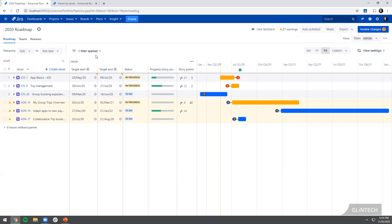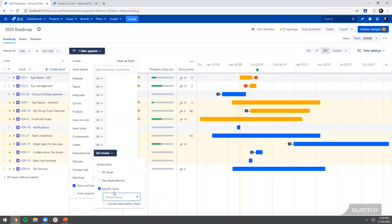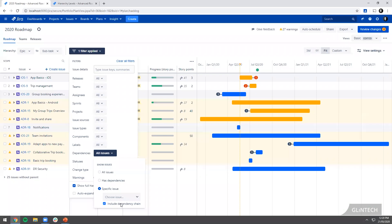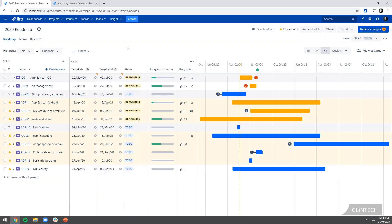Even better is the fact that we can actually filter by just a specific issue and include the dependency chain. So that will filter and show me all of the issues before and after that are affected. It's almost like the critical path if you think about waterfall planning. I can get a real view of all the things that impact when that piece of work is going to be worked on. Really useful way of getting some insight into those things that are traditionally quite hard to manage without asking every team individually.